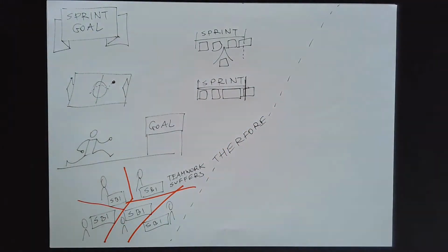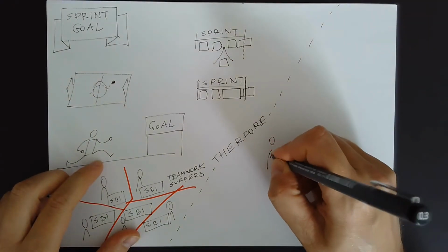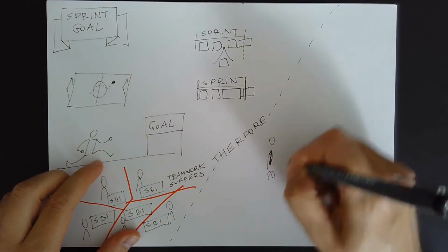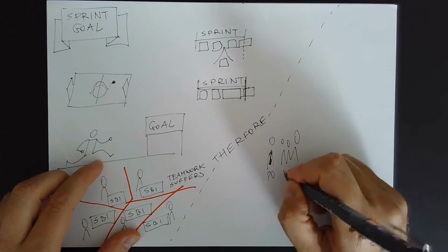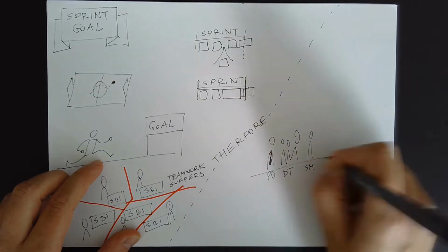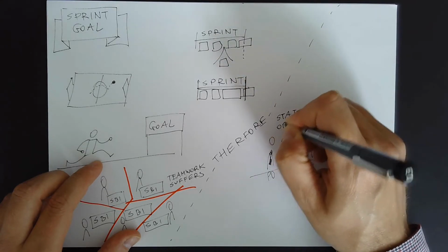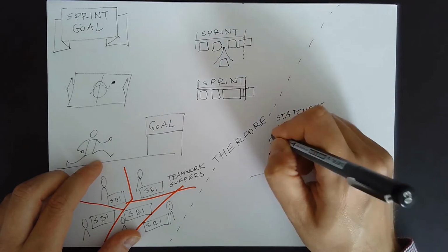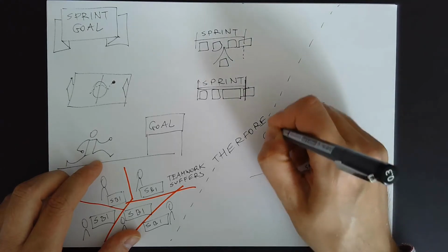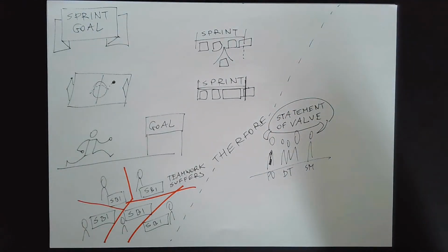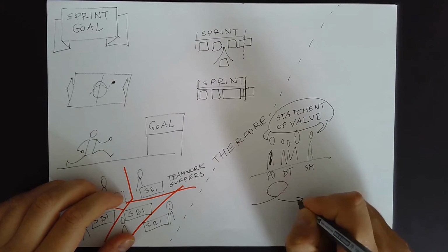This is often because the work required to complete sprint backlog items expands. Therefore, the Scrum team commits to a short statement of value it intends to create during the sprint. This becomes the focus of all work in the sprint. The entire Scrum team jointly creates the sprint goal. The product owner will naturally guide the creation of the sprint goal because he or she has the best view on the next step toward the product vision.